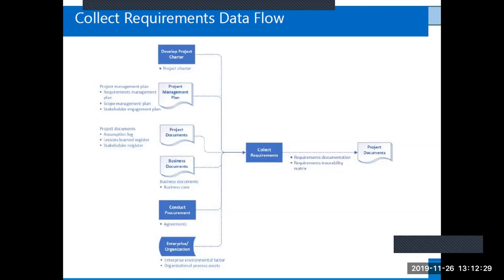or rather the primary project document, because you have business documents and you have project documents. Okay, so I'm trying to make sure the terminologies are well understood. The primary project document, the first project document that a project has from its creation, is the project charter. Meanwhile, the first document before the initiation of a project is actually the business documents. The business documents include the business case and the benefits management plan.